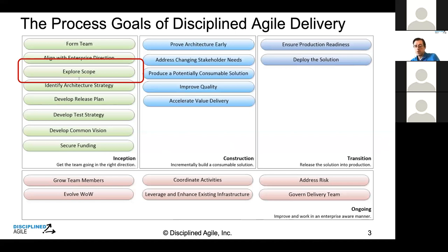So let's make it visible. Let's have a discussion about the value of the technical work. It doesn't have to be refactoring. It could be, as I said, I made a silly example of ordering servers or something. But this is work that has to get done. And a classic, more naive Scrum approach is just to put stories in the backlog. But there's all this other work that has to be done by the team or other people that should be prioritized and visualized, so people know.